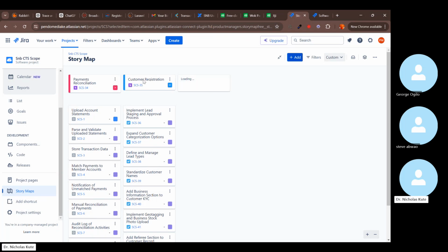Then under this epic, you can add the various stories that will form role-based access to system functionality. You want to make sure all the CRUD operations are associated with the various roles on the front end as well as the back end. Then you can list all the stories you think are necessary for this function to work. Then under each story, you put each task that you'll be handling, one by one.